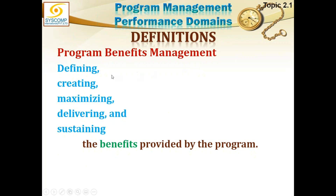For benefits management, we first define a benefits management plan: what benefits will come out of the program, how to create them, how to optimize and maximize them, how and when to deliver them, and how to sustain them. This includes the benefits transition, sustainment plan, benefit realization plan, and consolidation of all benefits. Defining, creating, maximizing, delivering, and sustaining benefits is the responsibility of program management.